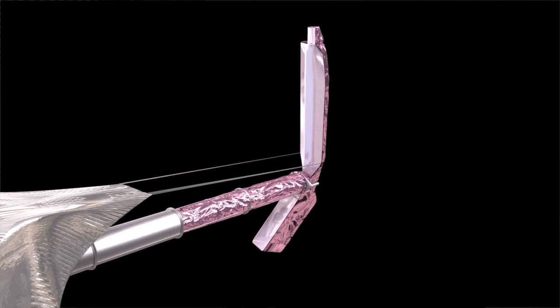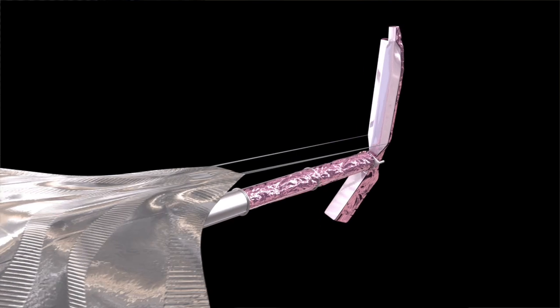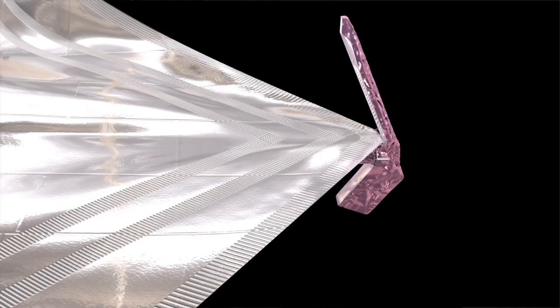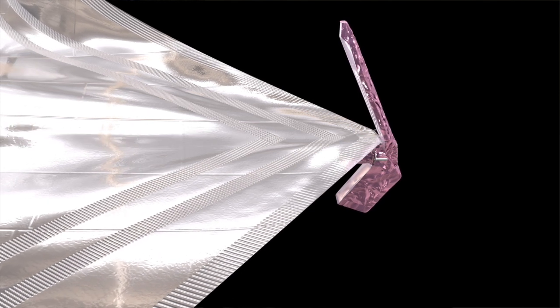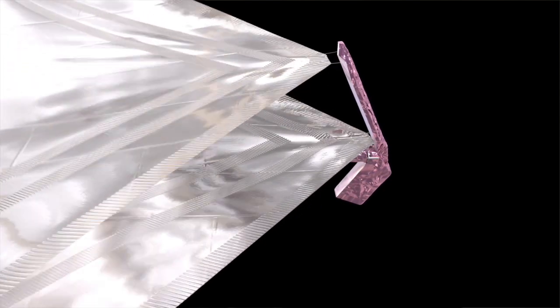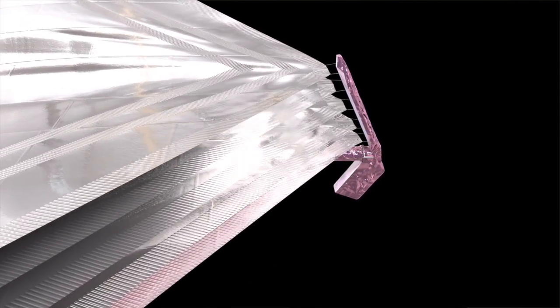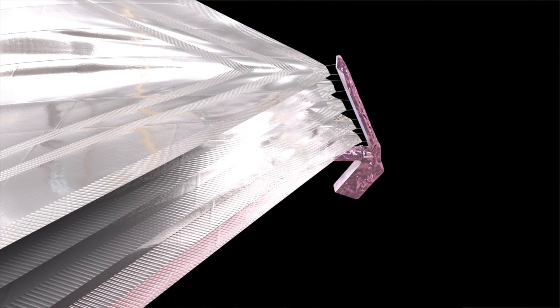Then we go into tensioning operations. Once we get the sunshield out, that's great, but then we have to sort of tighten it up. All 5 layers have 6 different points around there where they're connected up, and then we'll pull on cables in each one of those corners and actually tighten up the sunshield. And that takes a few days to do. So roughly, depending on how it goes, roughly day 10 or so, we'll get into what we call our telescope